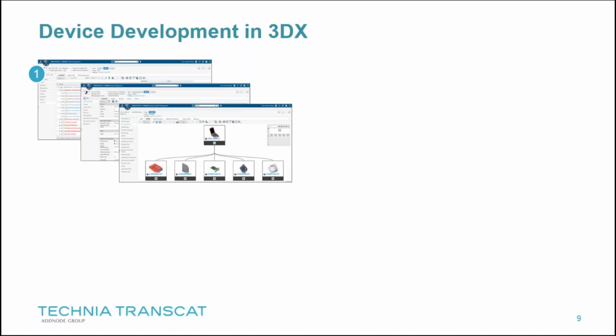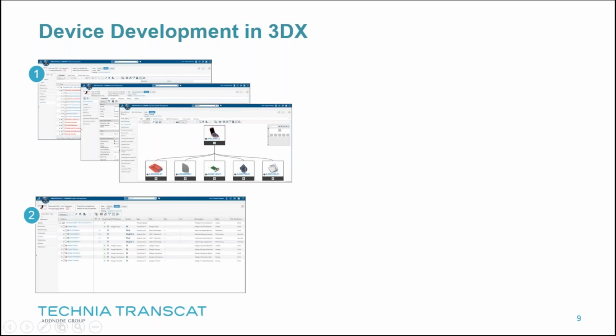So that's really one of the key messages here, that we have a project, we're connecting it to the product as well as the part and the bill of material and the DMR. And as we are progressing through the gates and the gate approvals, we're building up the DHF. And the DHF is really built upon tagging our deliverables as we move along through the stage reviews. And they are approved and updated on the product DHF as part of the project approval.